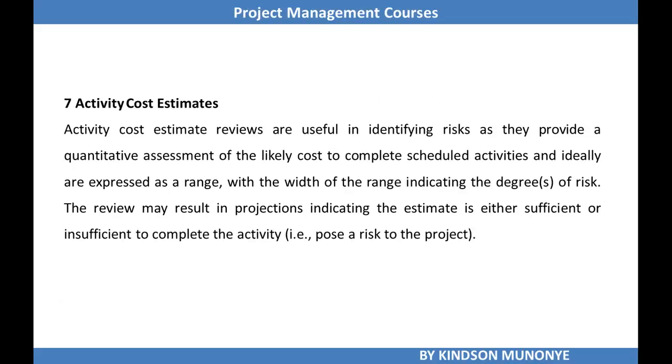Activity cost estimates are useful in identifying risks as they provide a quantitative assessment of the likely cost to complete scheduled activities, and ideally are expressed as a range, with the width of the range indicating the degree of risk.